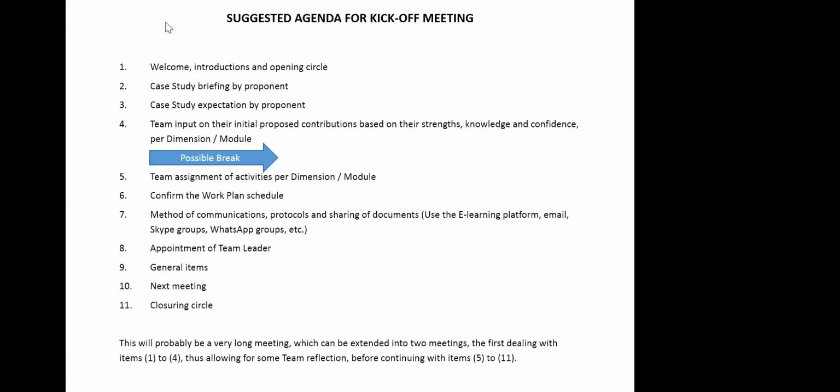Obviously, you've got a mandate to not go too far within the case study, but you can take it as far as concept and then clearly outline the next steps towards a detailed design. That is normally done in a feasibility study anyway. But the broader stakeholders that you ought to, if not consult, at least think about and do some online research on: if you submit a formal proposal for how this campsite could be refined or reinvented, are there any planning bylaws that are triggered, any environmental approvals that you think may be triggered?